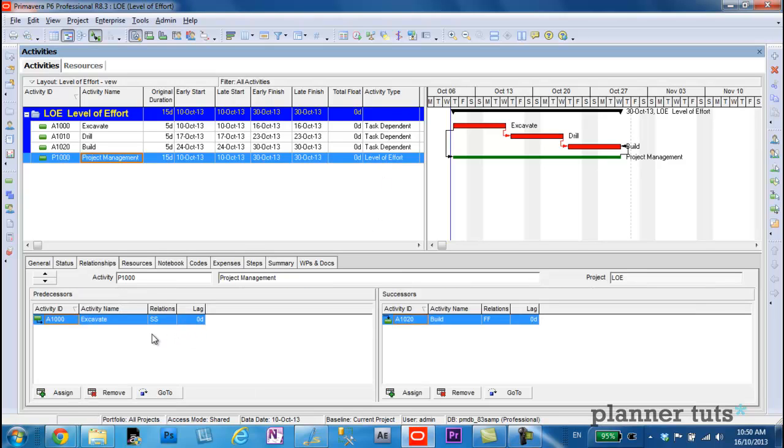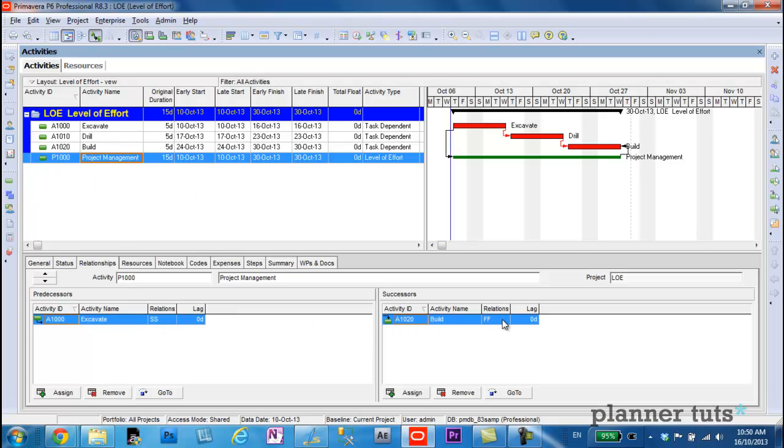Level of effort activities, if you're not aware, we link them usually with a start-to-start relationship to the first activity. So it has a start-to-start with excavate, and it has a finish-to-finish relationship with the build activity.